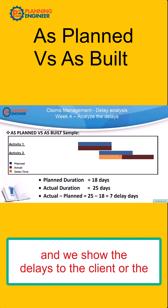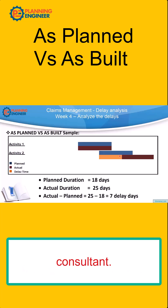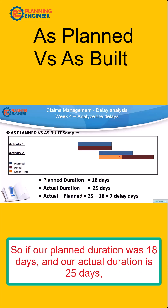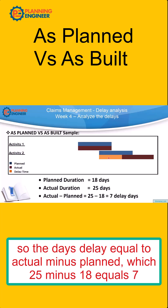We put the planned, we put the actual, and we show the delays to the client or the consultant. So if our planned duration was 18 days and our actual duration is 25 days, then the days of delay equal actual minus planned, which is 25 minus 18 equals 7.